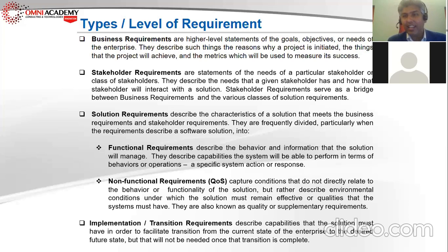factory, and at the end, when they found out where they wanted to place it, there was no door to take that machine inside that room. They had to cut the roof and put the machine inside the room, and you can still go there and see the roof has patches everywhere. So this is the importance of transition requirements.